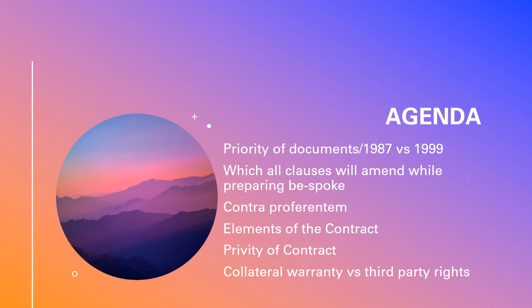But mainly, payment terms they will change, variation clauses they will change, the employer claim clause 2.5 they will change, and the contractor's claim clause 20 they will change, and sometimes clause 4 they will modify. In clause 1 and clause 2, in which the employer's responsibility is mentioned, that will change. Then if you go to the termination clauses, they will change a couple of things, where there is some provision for the contractor to terminate the contract. Those clauses may be modified. They will change the DAB methods, they will change the laws, all those things.